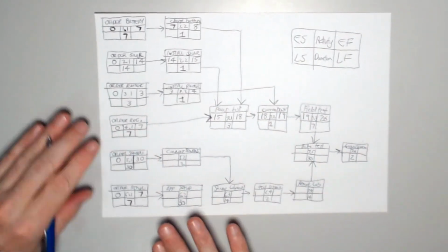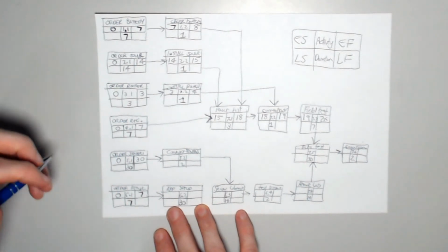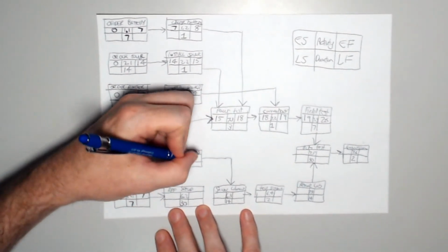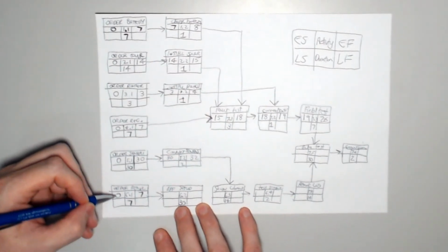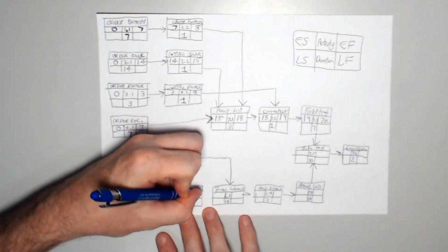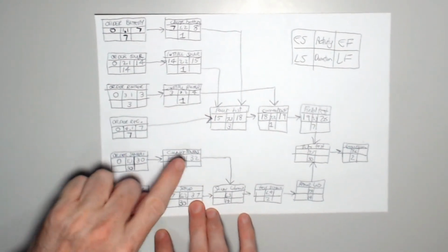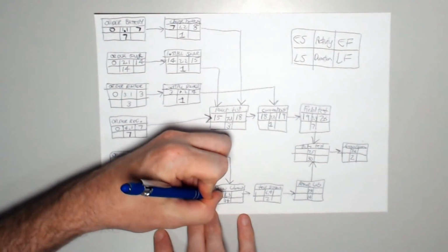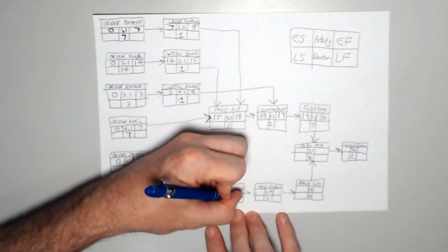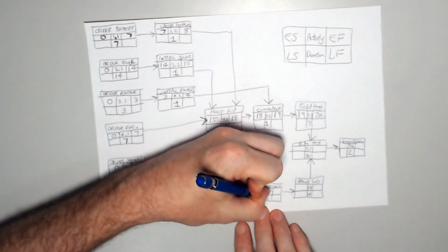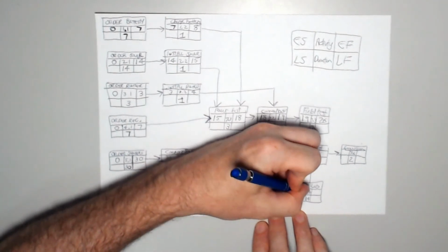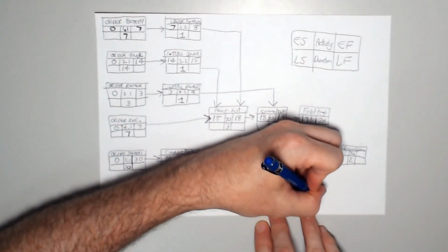And before I do this bit, I'm going to come back here and finish off. Okay, so ordered sensors, 0 to 30. 30 goes here. Took 2 days, 32. Ordering that mold took 7 days. Put the 7 here plus 30 is 37. Oh, arrow here. 37 or 32. Well, 37 is bigger, so the earliest start is 37. Add 14 to that is going to be 51. There's only 1 arrow, so 51 plus 2 is 53. 53 plus 14 is 67.